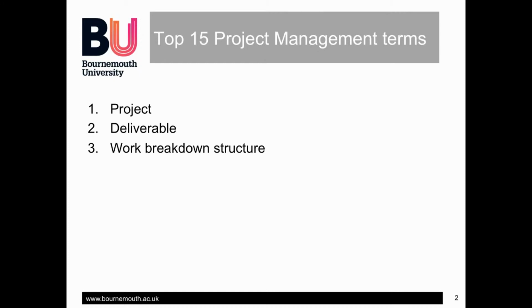To demonstrate this, let's return to the party project mentioned earlier. If we think of the party as the main deliverable, we can use the concept of a work breakdown to help us understand what components go into the party. This is the process of breaking down the project, or decomposition as it is also known. We could break down the party into the elements of venue, guests, entertainment, food and drink.